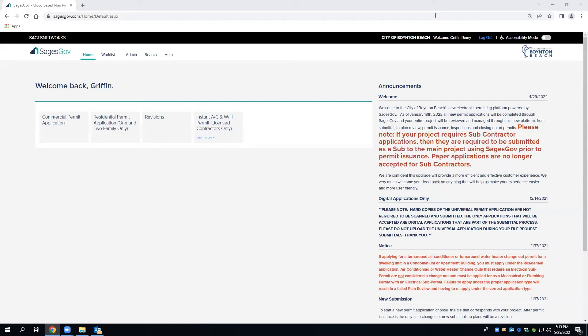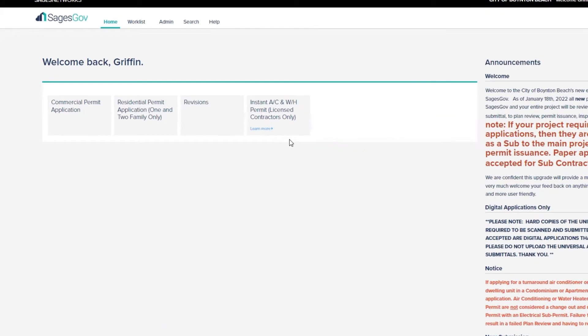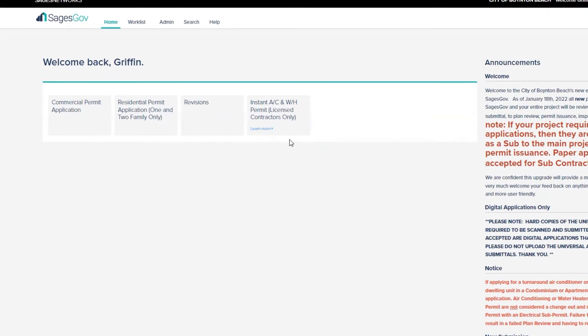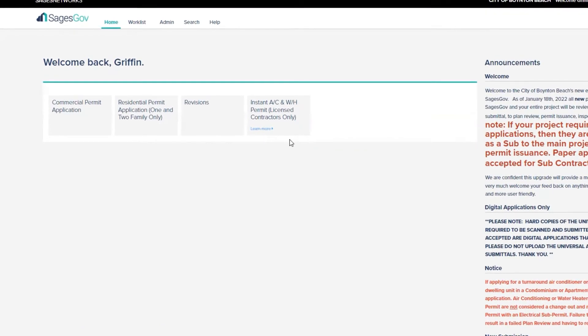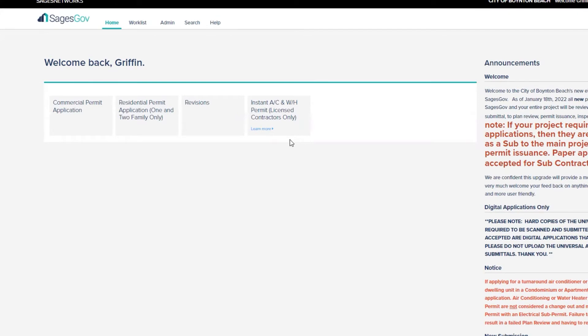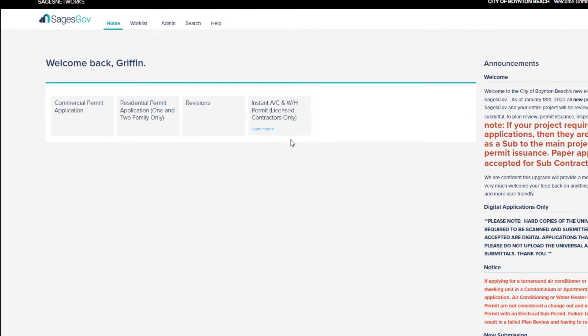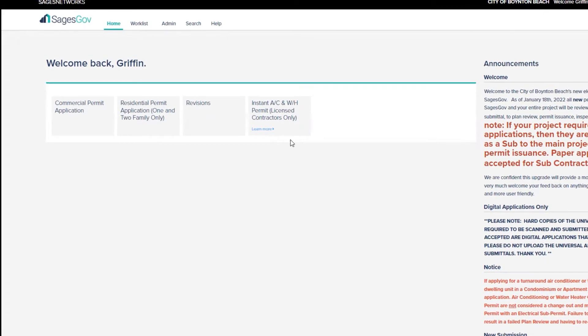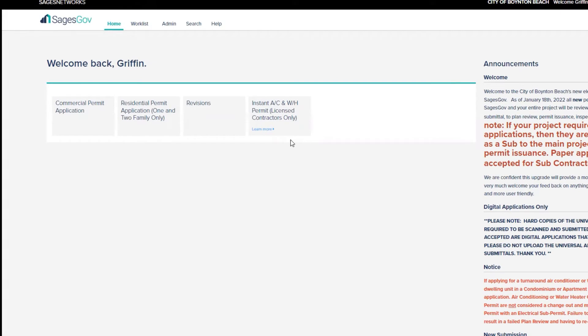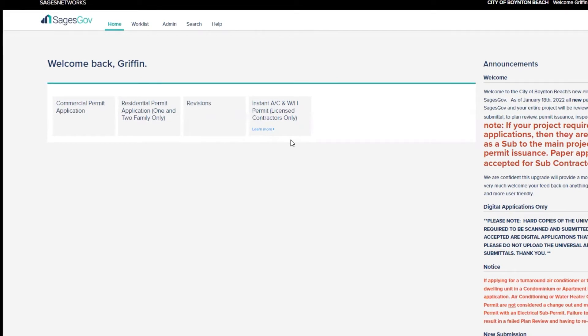Once you've logged on to your account, you'll see that you have four options. Now before you can apply for a sub-permit, there are two pieces of key information that you're going to need. You will need to know the type of permit application that was selected for the master, as well as the project case number for the master project.